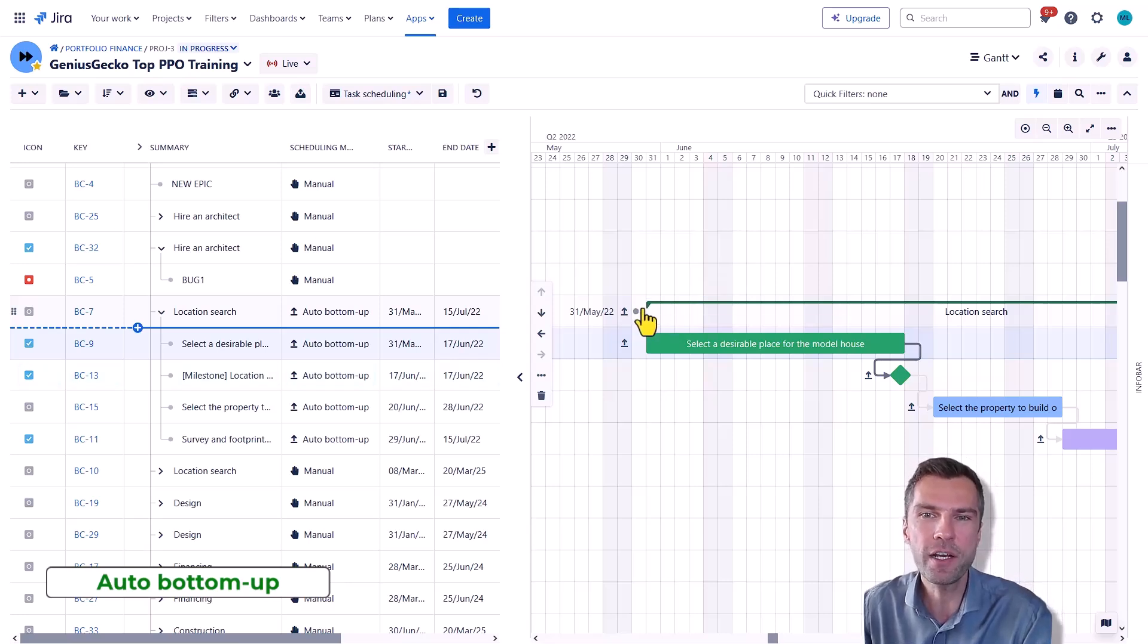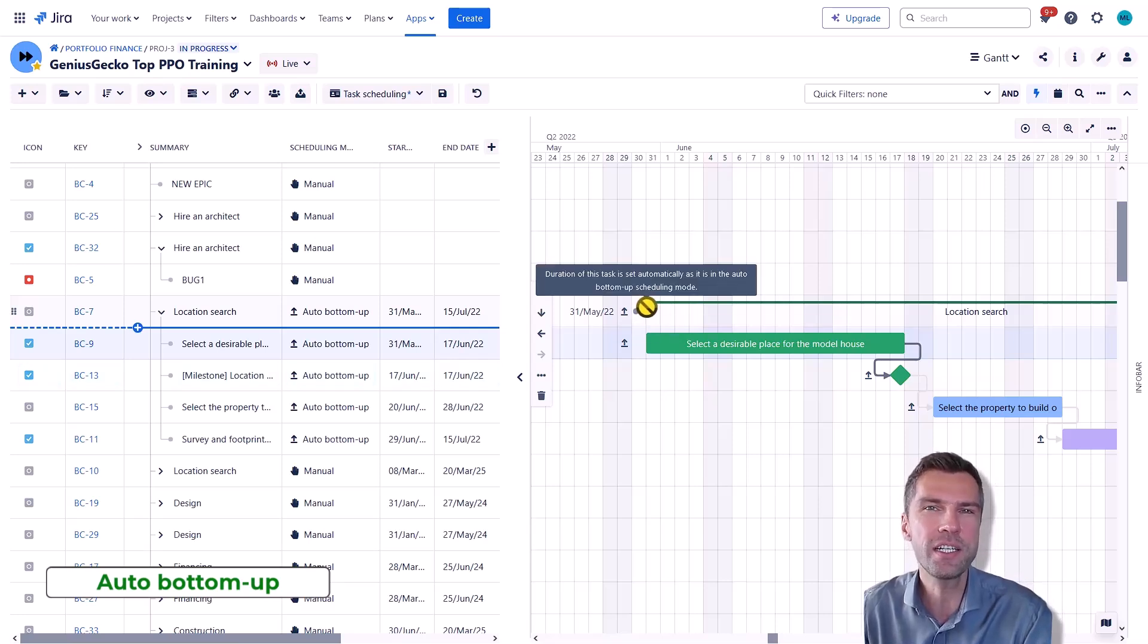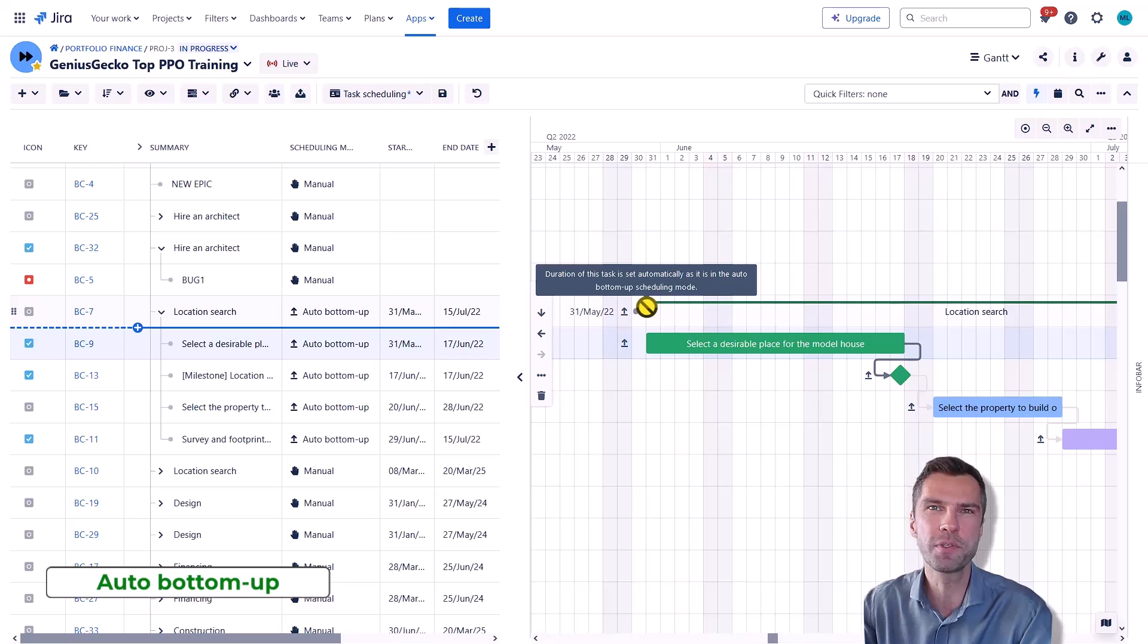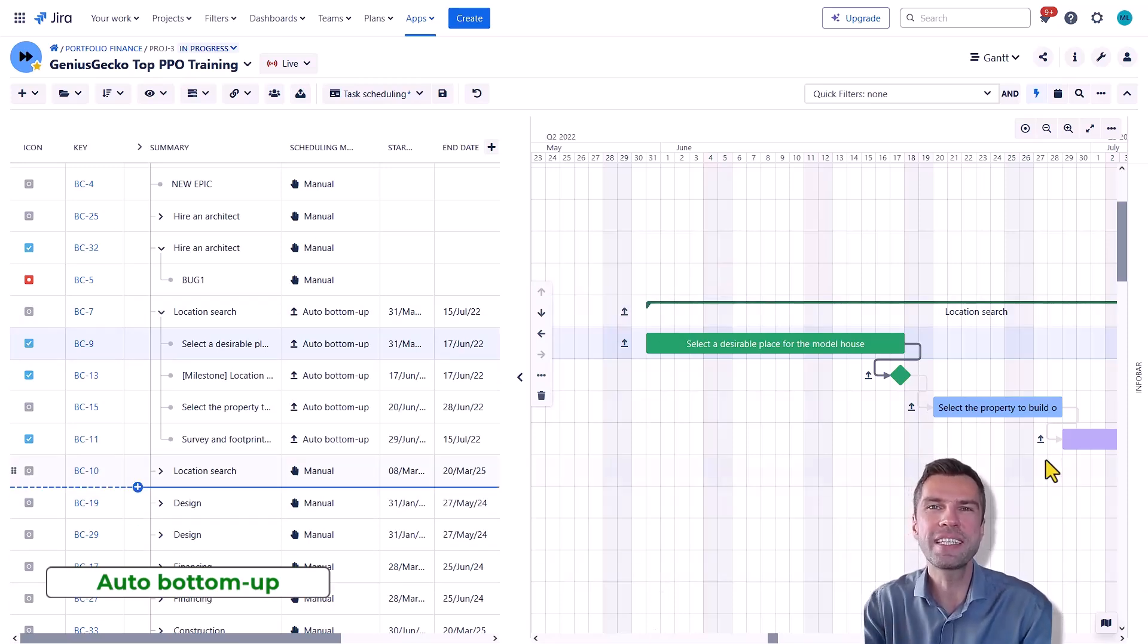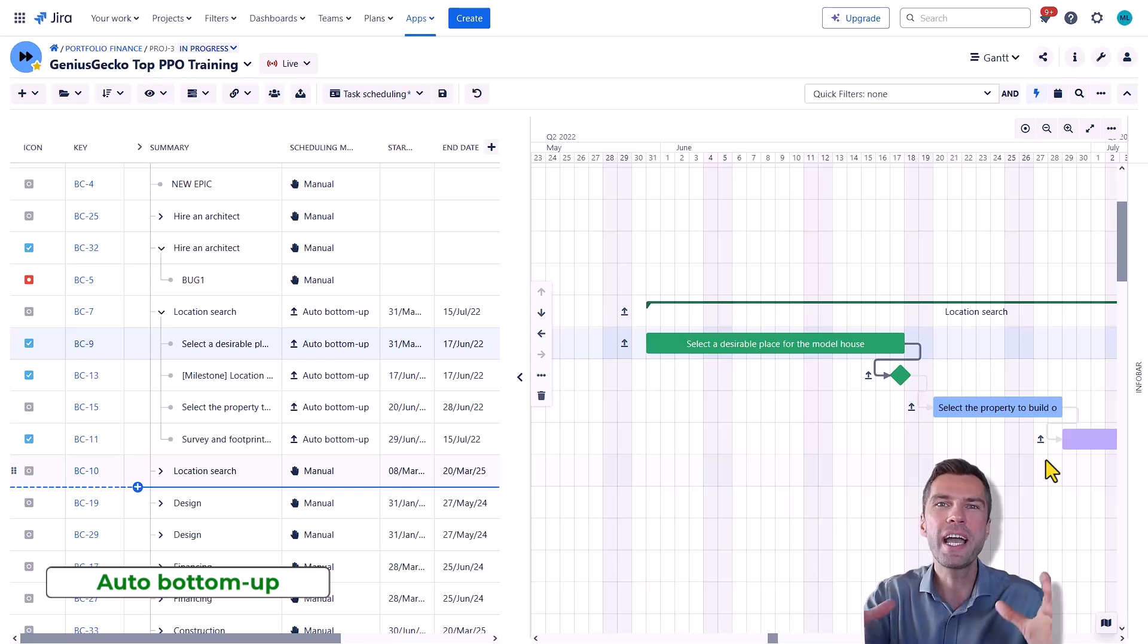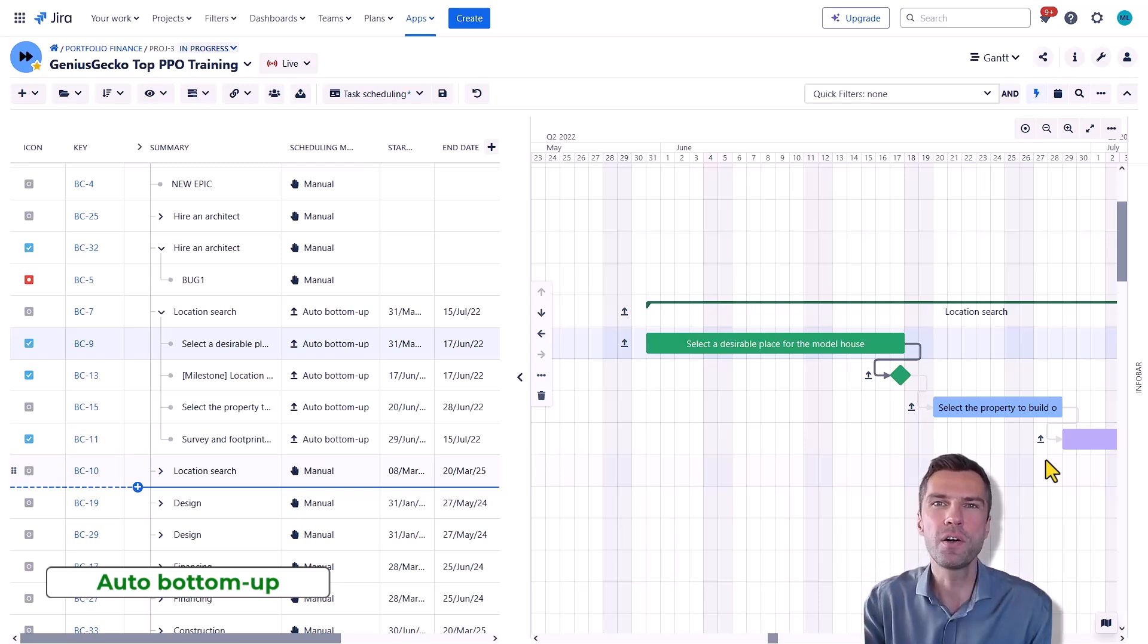So as you can see, if I hover over the start date of the parent task, I will not be able to change it. So this is great for projects when the timeline of the project or higher level task depends on the lower level items.